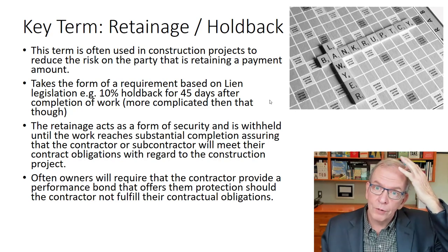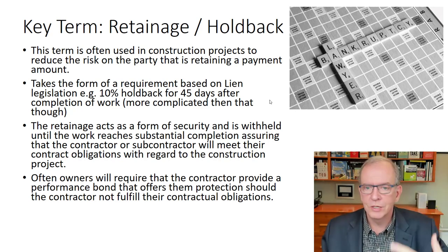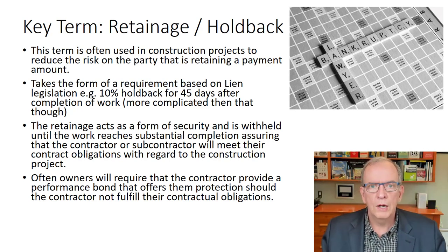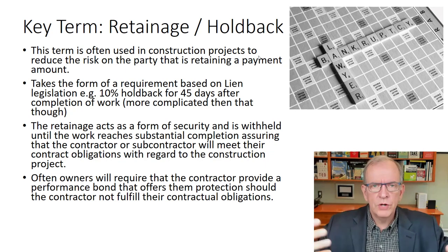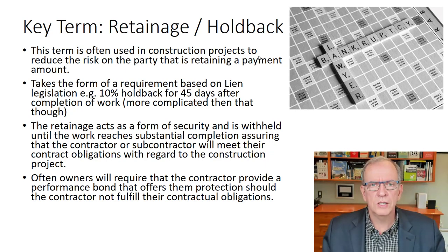Now we also have requirements, and again, it depends on your jurisdiction, your country, etc., where you've got holdback requirements with lien legislation. North America is pretty common with 10% holdback requirements, and without getting too deep into the lien legislation requirements, it's to protect different trades and contractors working in the construction sector so that they actually get paid. So in other words, the client would hold back 10% from the contractor